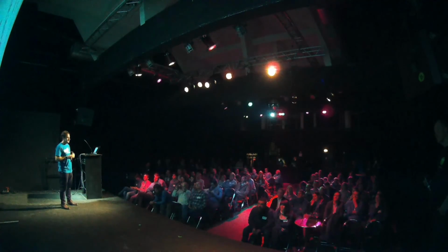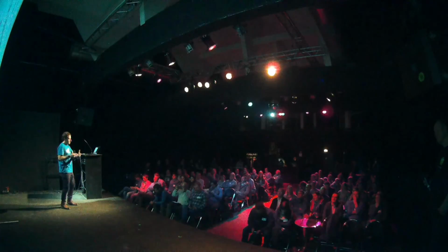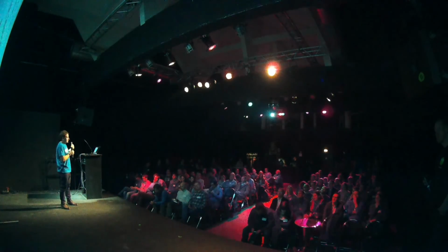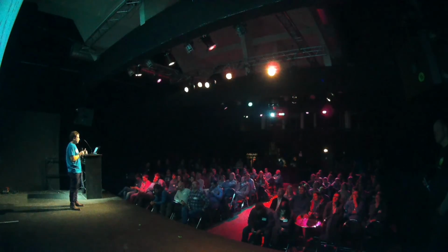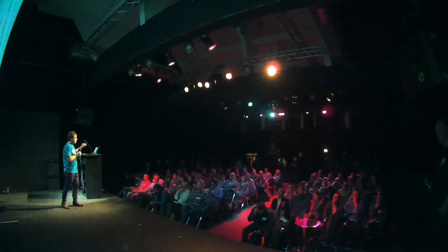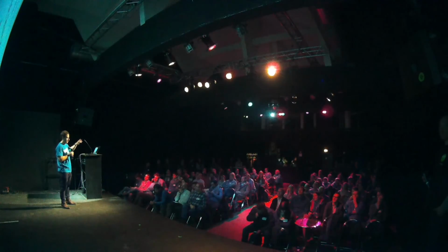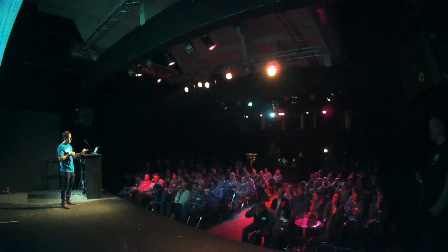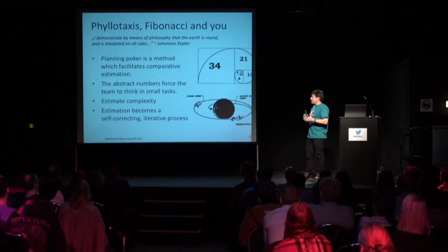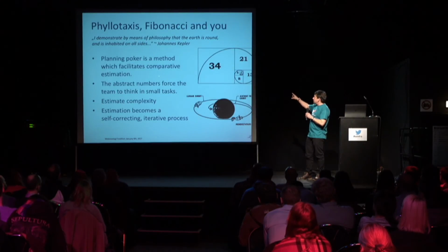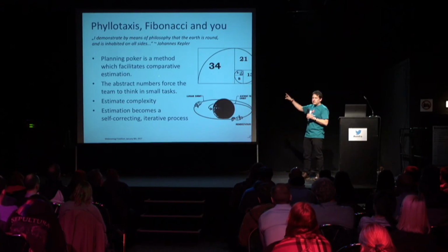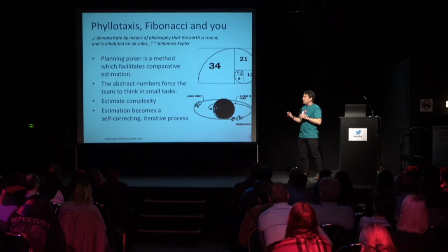Fibonacci, however, is. When we are generating our comparative estimates, it helps to use a set of numbers which aren't linear in progression, but which are geometric or organic in progression, to more starkly contrast the levels of complexity which are being estimated. If there's a whole team and you are putting numbers to abstract complexity onto individual tasks, you can force people to think comparatively.